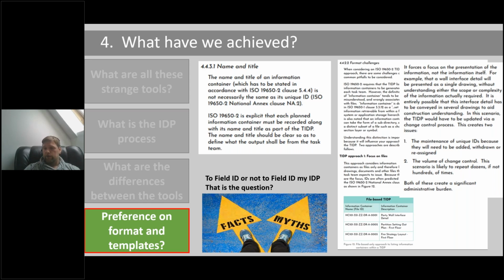the way that ISO 19650 allows, because I still need to not track my drawings by stage, because some of the MIDP templates that I've seen, it's like, when is this drawing going to come at stage 3, 4, and 5, and doesn't allow for any dates. You see, I'm only interested in dates, not stages.